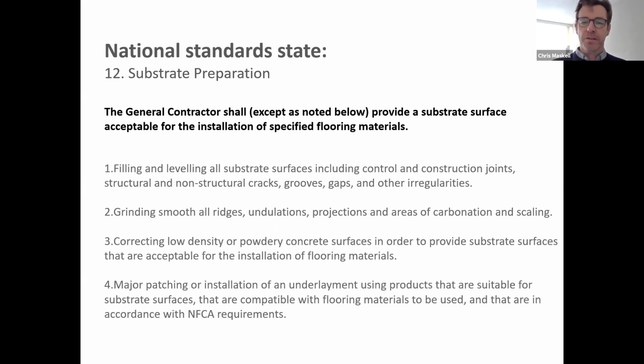Whoa, too much information. Sorry, not expecting you to read all this, but I do want to just point out that this is a section that deals with substrate preparation, which is a very contentious issue in the manual. If you just read this sentence, which I bolded, once we get this specified and included into the documents, it becomes contractually binding to follow through on this language. This language is not out to just protect the floor guy. It's there to protect what is logical. It makes sense, all this stuff. And we know it does because it does work.